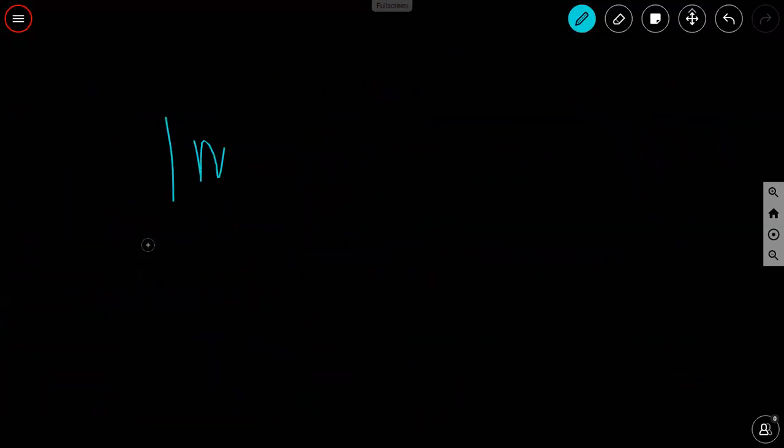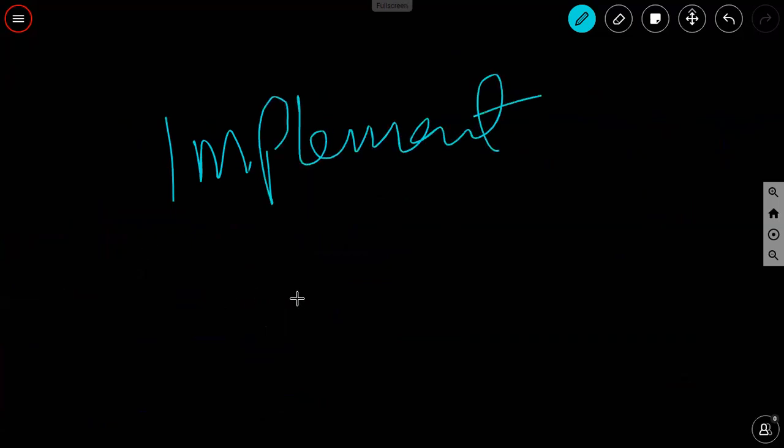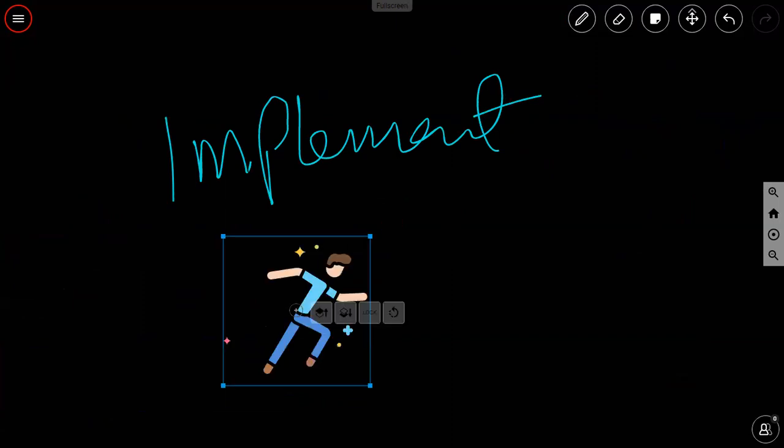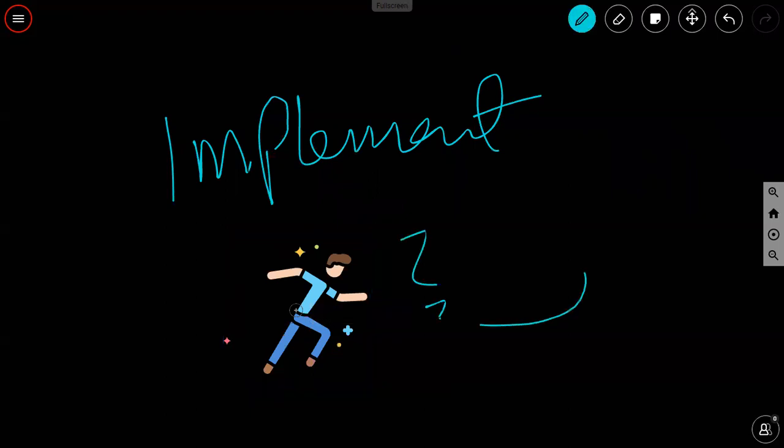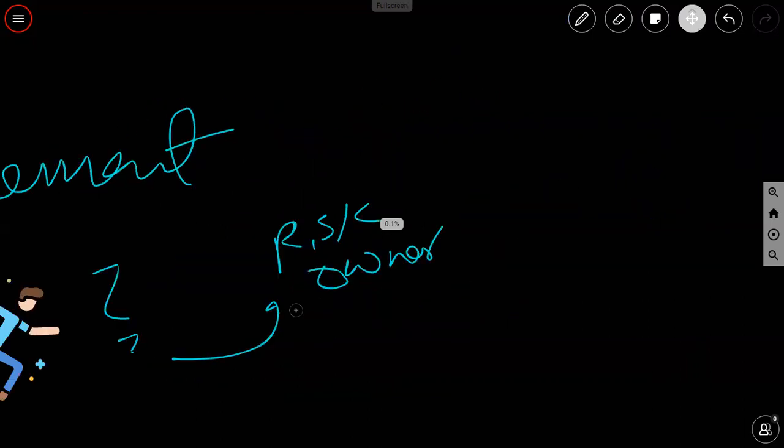The next thing is you're going to implement those risk responses. So again, someone's got to do the legwork, someone's got to carry it out. We call that the risk response owner or the risk action owner. So the question is, who is a risk action owner? That person reports to a risk owner, the person whose objectives are most likely to be impacted by that risk.